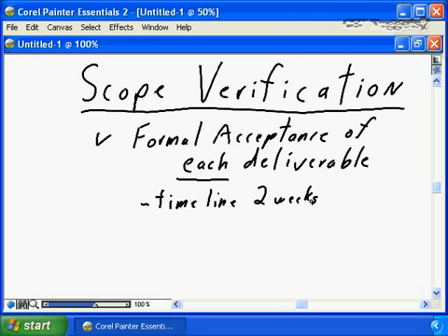Often, projects will make mistakes and there will be remediation required for the deliverable. You'll have to fix the deliverable. You'll have to make adjustments to the deliverable. Then you need to have a defined turnaround process. This means if the acceptor used several independent reviewers to review the deliverable, you are expecting the acceptor to deliver a single set of comments.